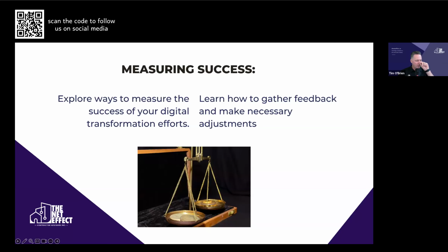That can be dependent on your gross revenues. Typically, it's more dependent on a monthly, whether it's a flat fee or a yearly flat fee, but also on the number of users. So you have to first calculate how much the software is going to cost us this year. And then the other one would be how much time it is going to take our staff to train up on this, because you're investing time in the training.